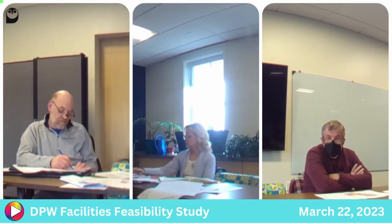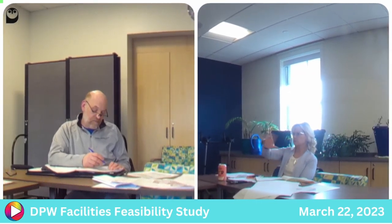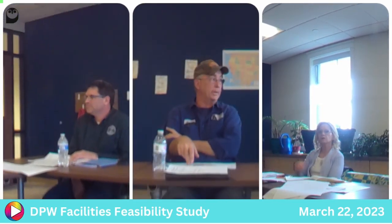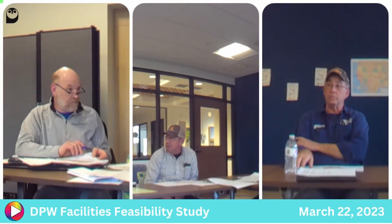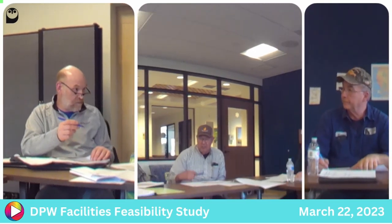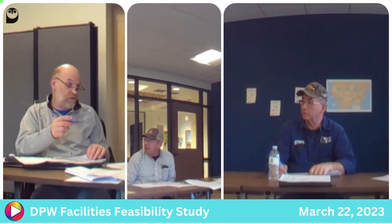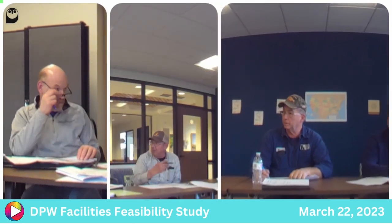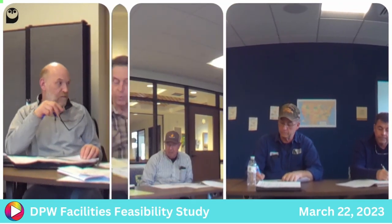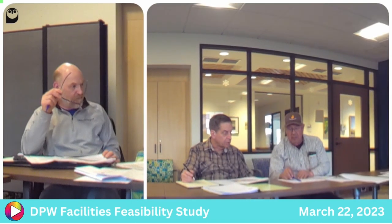So that 27 million obviously doesn't include the costs of replacing the water lines that are too small? The 27 million does not include the water main? No, it doesn't. Then how did you get 22 and 27? 22 million is the construction cost for concept one, and 27 is the total project cost, and that doesn't include the water. Right, but I thought that included the water.